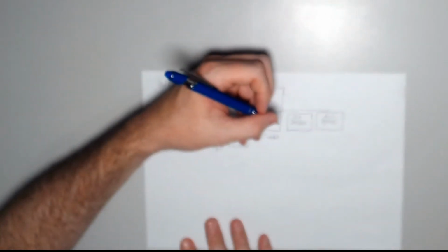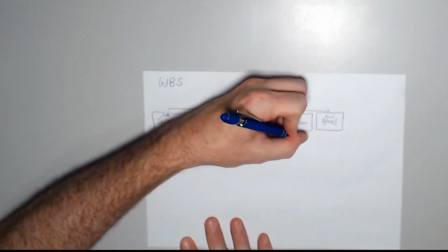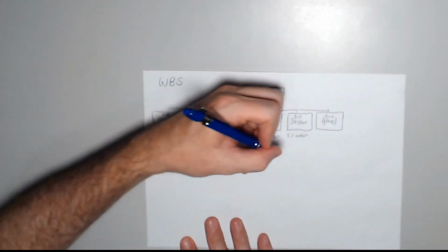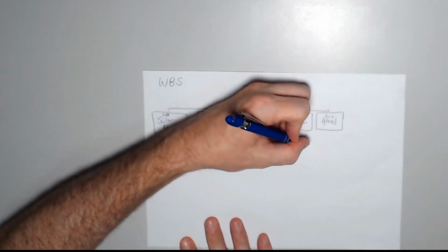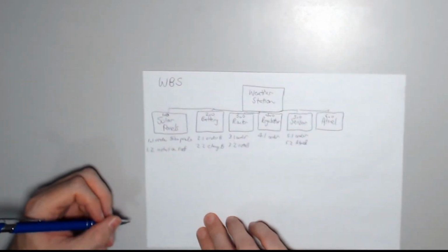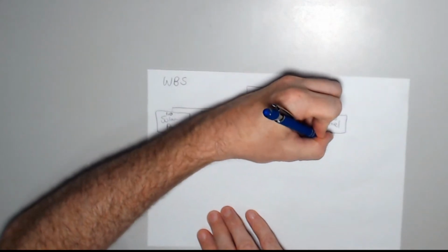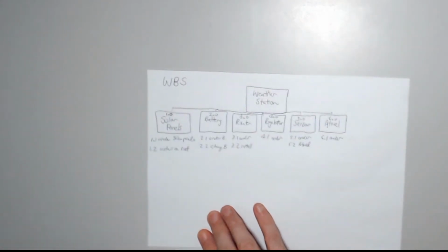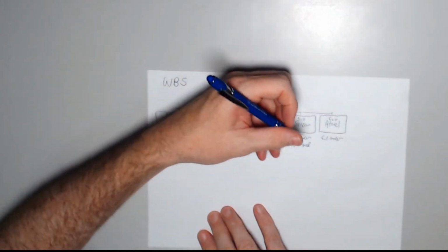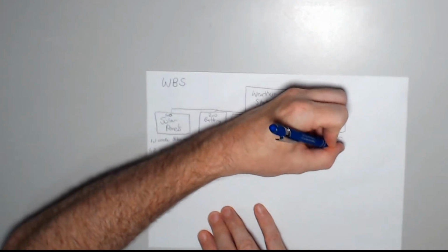Then on 5, for sensors, I'm going to 5.1 order sensors. 5.2, I'm going to connect the sensors to the Atmel. I need to connect them at some point. The Atmel, okay, so 6.1, order the Atmel. Then I'm going to do some software programming of the Atmel. So I've called this 6.2 application setup.